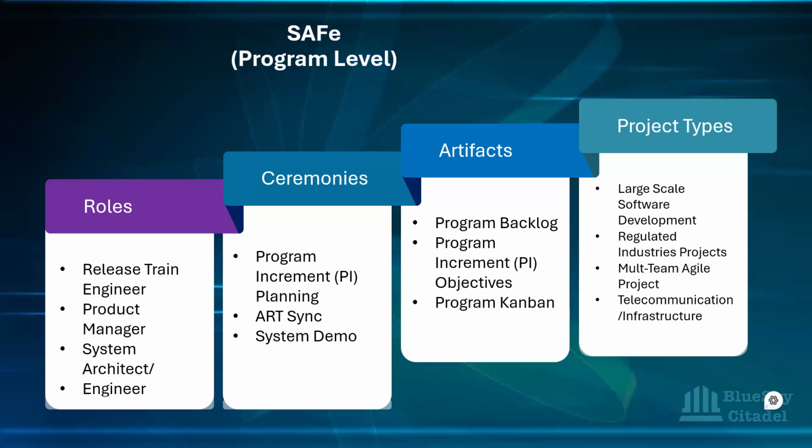It could be 8 weeks, it could be 12 weeks that they've planned it for. That's the timeline for everyone, or for that goal, to be achieved. So they come together during the PI planning to discuss how it's going to go. The teams align on the overall objective. Dependencies are identified.